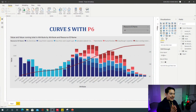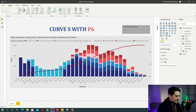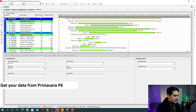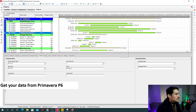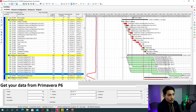So if we want to start creating a Curve S like the one you are looking at on your screen right now, we need to go through these steps. The first step is to get our data in from P6. We need to open Primavera P6. I have a bunch of sample data in my P6, so I'm just gonna use this project I have already opened here. Make sure you have a resource-loaded schedule so we can pull the data from the resources onto Power BI.